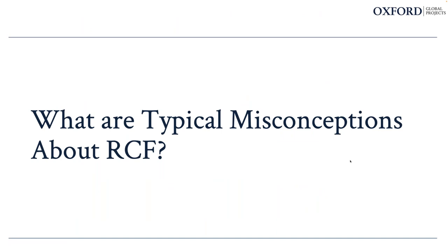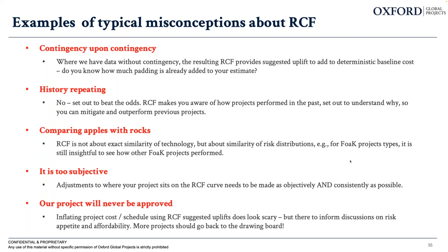So that said, what are the typical misconceptions about RCF? These are some of the things that our clients say to us again and again across various industries. There is a lot of talk about, well, this is just like contingency upon contingency, and it's so inflated. Ideally not, right? Where we have data without contingency, the resulting RCF provides a suggested uplift to be added to your deterministic baseline cost. So ideally, within an organization, you would know how much padding is already added within your estimate, and you need to strip all that out before you add the suggested RCF uplift.